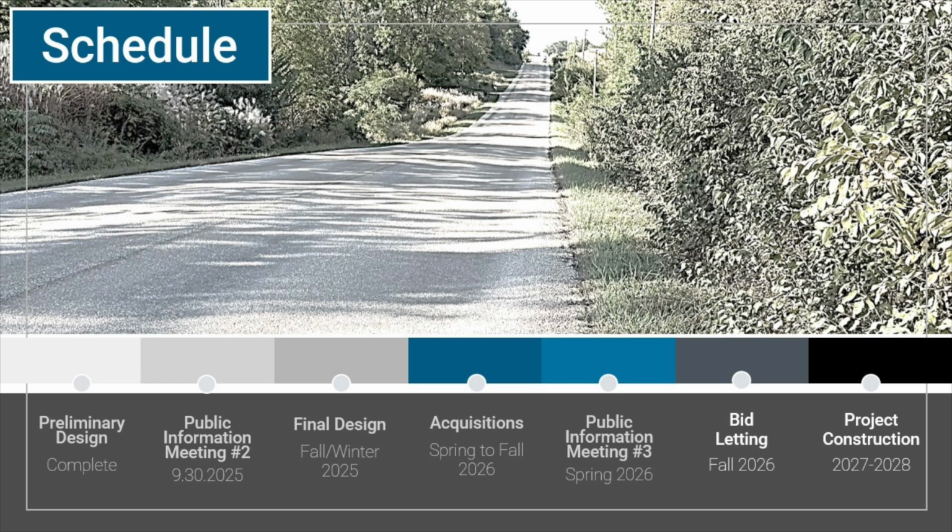So just moving on here to the project schedule. So we met here about a year ago, and the thought was we were working through design, and construction was going to start here in 2026, and so everything's kind of slid back a year. Couple of reasons for that. There's been some funds allocations with the city, which have resulted in that sliding a little bit. Also, with some other projects in the city, we've given a little more time for private utilities to relocate, so we aren't running into those and having to do a bunch of relocations during construction for those private utilities.